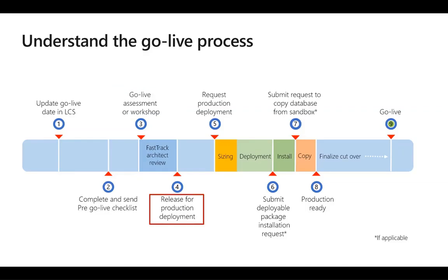The fourth step is release for production deployment. In this step, if the production deployment request has already been submitted, deployment will start. However, Microsoft requests that we only submit the production request after the assessment has successfully completed. We should perform this task upon a successfully completed assessment.